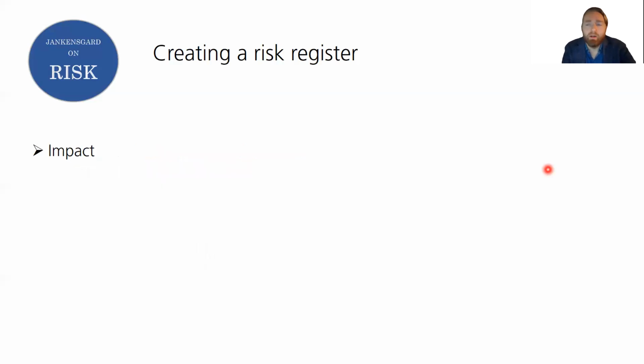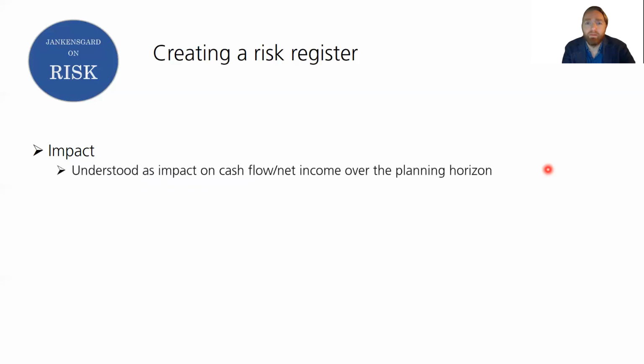All right, so impact. All these things are hard to quantify, I guess, and the complexity can be tremendous in many cases, and it's all vague possibilities, so who on earth could actually quantify that, you might think. But we're going to have to try, because it's all about relative likelihood and the impact of that risk if it were to happen. I mean, that is risk, probability times impact, and we have to try to get a grip on it.